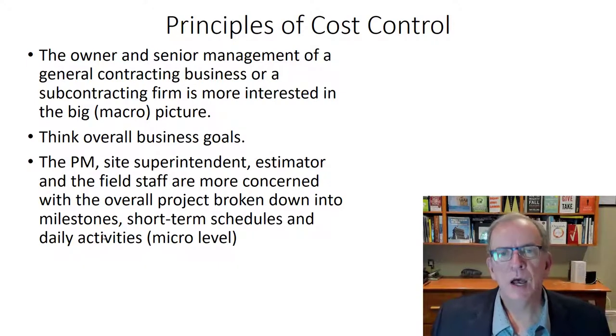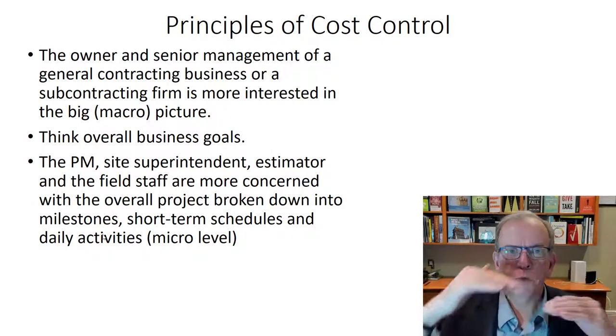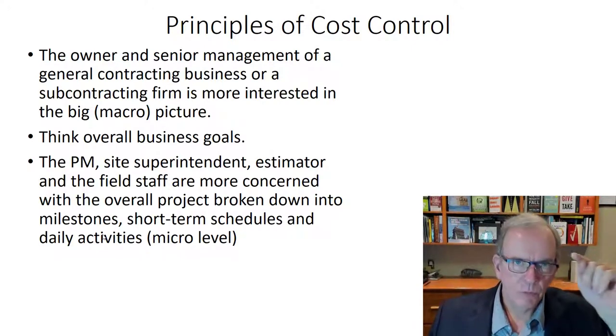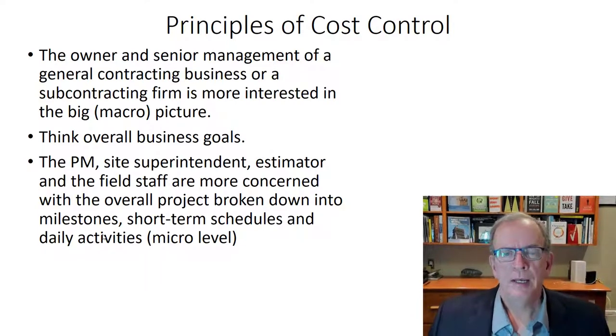Well, it's not that different in construction. Same idea. I've got this project, and it's going to take 2 years to construct. That's fine, so we have to have a work breakdown structure. These are the elements of the project and how we've broken it down. Then within that work breakdown structure, what do we have to do, and in what time frame?